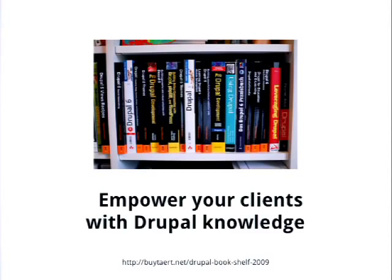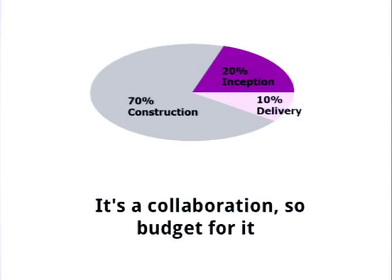Suggest books to read. Give them Node 1 tutorials. Just really make it clear that you expect some engagement from them on this level. Get them involved in technical conversations — don't just say 'tell us what you want, don't worry about the technical side, that's our job.' Force them to get involved in these decisions. And when you're doing a project plan, budget for it, because you're going to need this time to talk things over and really iron out the specifics.